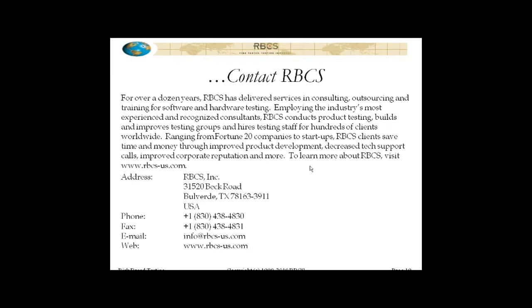Yes, certainly. Basically what I'm talking about there, C's, is when you go through and look at the new information that you've gotten, whether that be test results or design specification or what have you, you want to say, okay, is there anything here that tells me that my risk analysis is missing a risk item, or that the likelihood or impacts need to be adjusted?